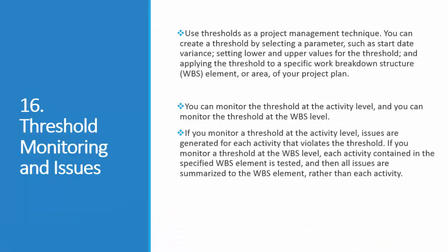And next we go into threshold monitoring and issues. You can create the threshold by selecting a parameter such as start date variance, setting lower and upper values for the threshold, and applying the threshold to a specific work breakdown structure element or an area for your project plan. It is nothing but like running a formula or a pivot in Excel with defined parameters.